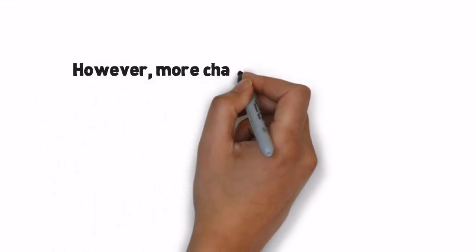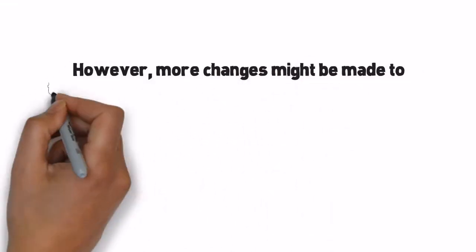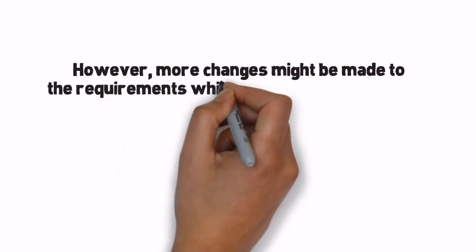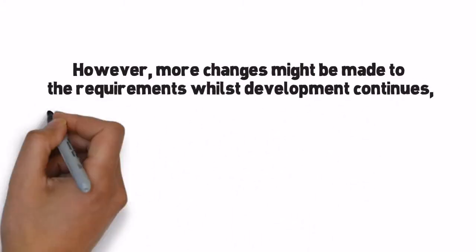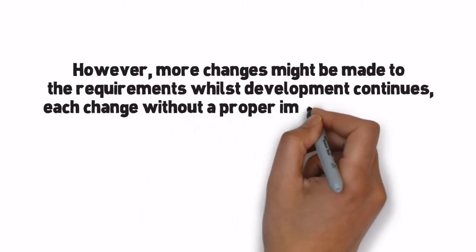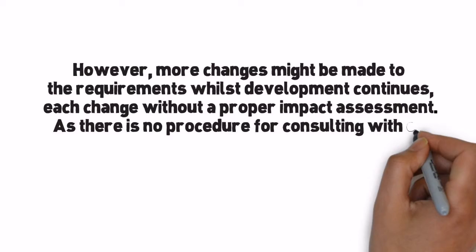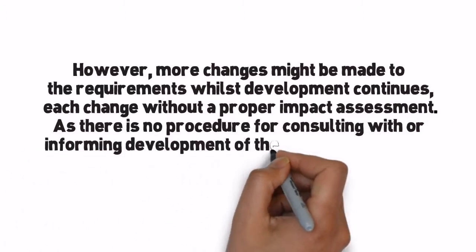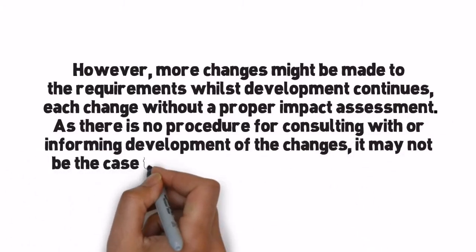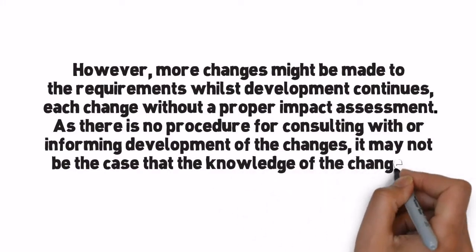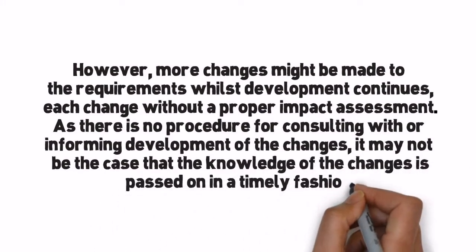However, more changes might be made to the requirements whilst development continues, each change without a proper impact assessment. As there is no procedure for consulting with or informing development of the changes, it may not be the case that the knowledge of the changes is passed on in a timely fashion.